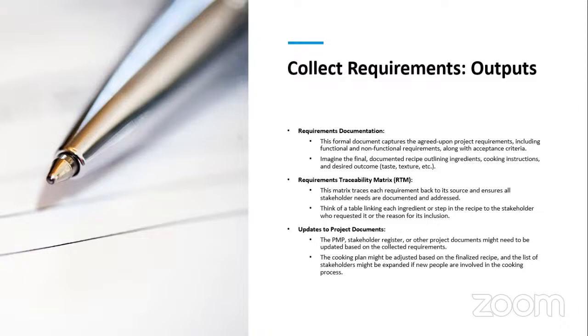Now, what the traceability matrix does is this, and it makes it simple. The traceability matrix tries to align each stakeholder objective, each stakeholder requirement, each stakeholder need to the ultimate goal of the project. So if the stakeholder says, I want a return of 50 million naira as my investment in this project, the project manager, with his business domain and business acumen, wants to align this project. Is it meant for return on investment, profit? If there is profit maximization, then he will link that particular expectation to profit maximization.